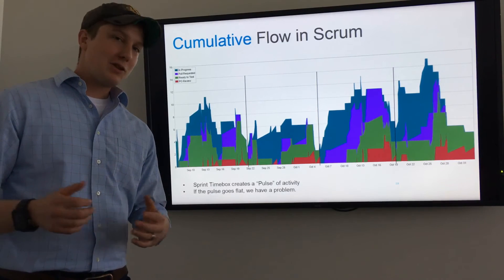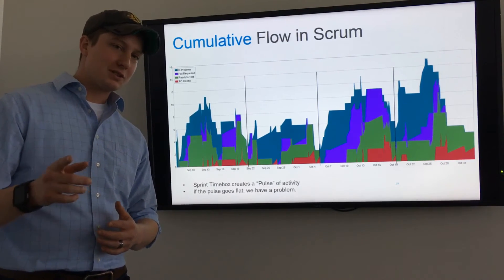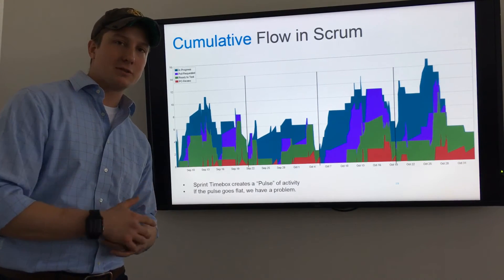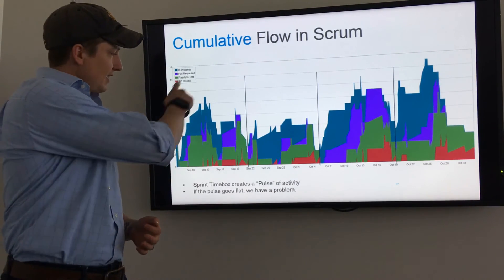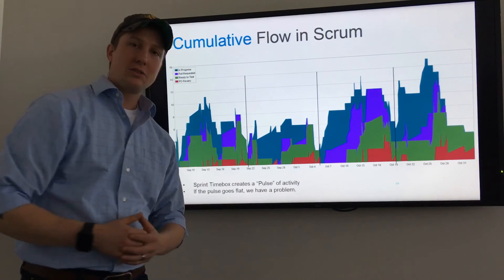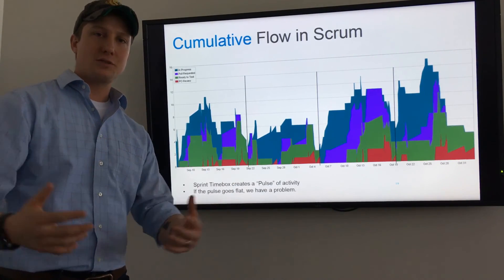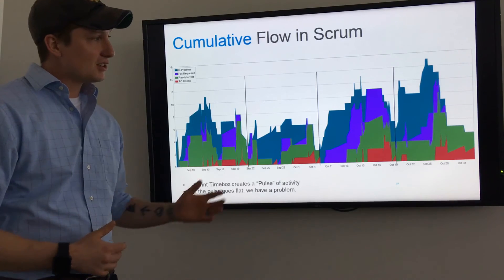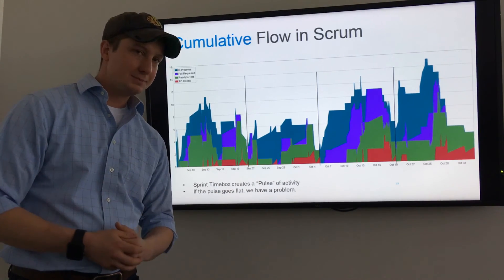Another great way to track the lean health of your Agile organization is a cumulative flow diagram. In Scrum, you should see peaks and valleys — that is the pulse of your organization. If that starts to disappear, you know there's a problem.